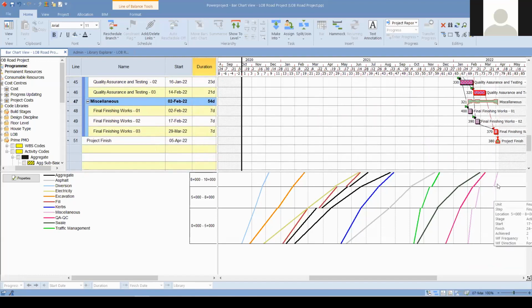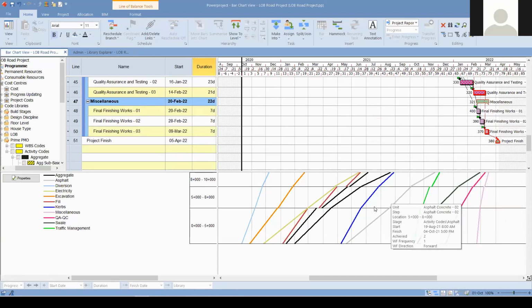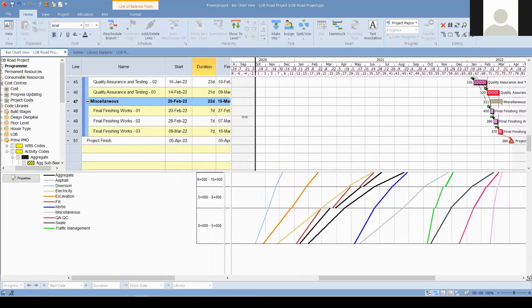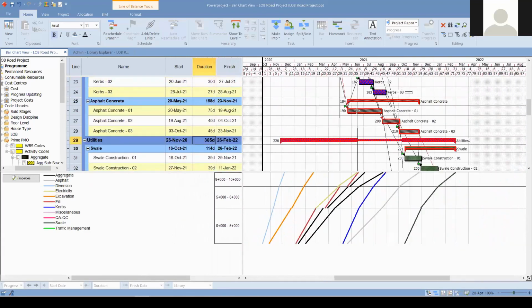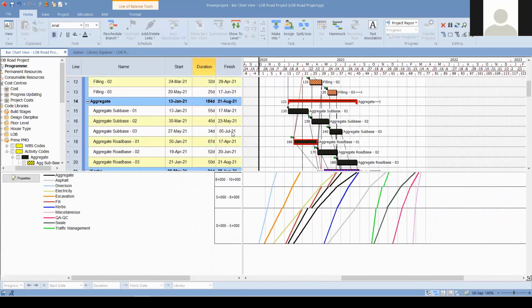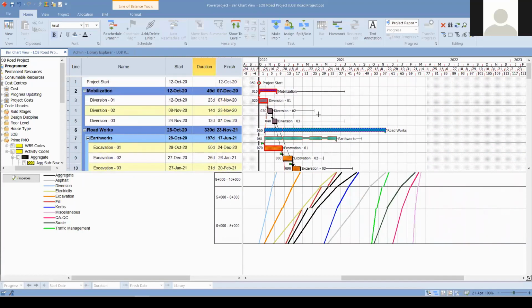Without extending anything on our project finish date, we are able to play with the activity starts and finishes, making sure they are all following their previous crew activities, and we are able to finish the project scope on the 9th of March, which is much before the 5th of April, approximately 1 month earlier. We are able to finish these activities, and also the project, earlier than the first plan.